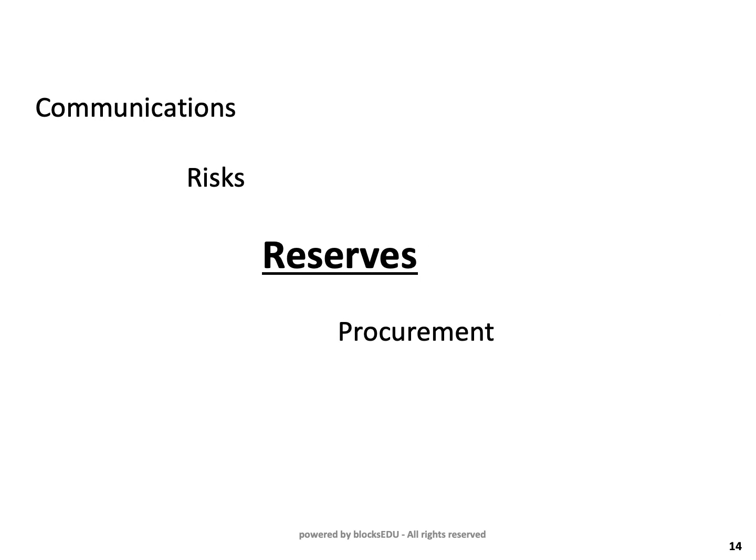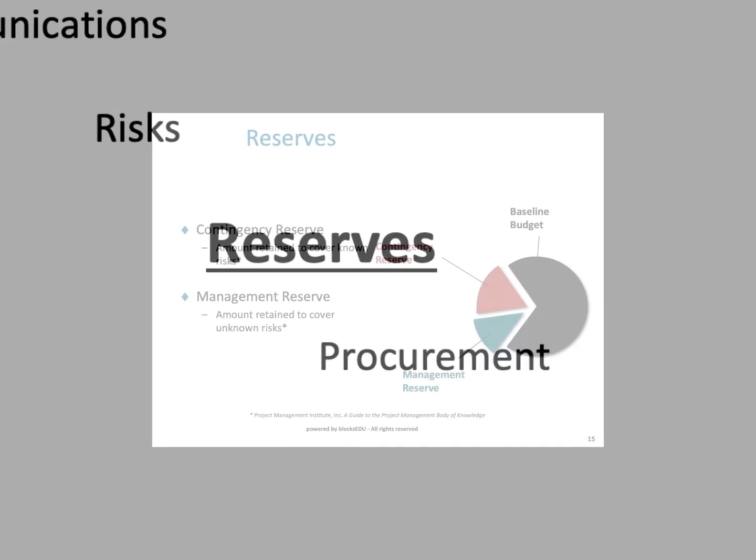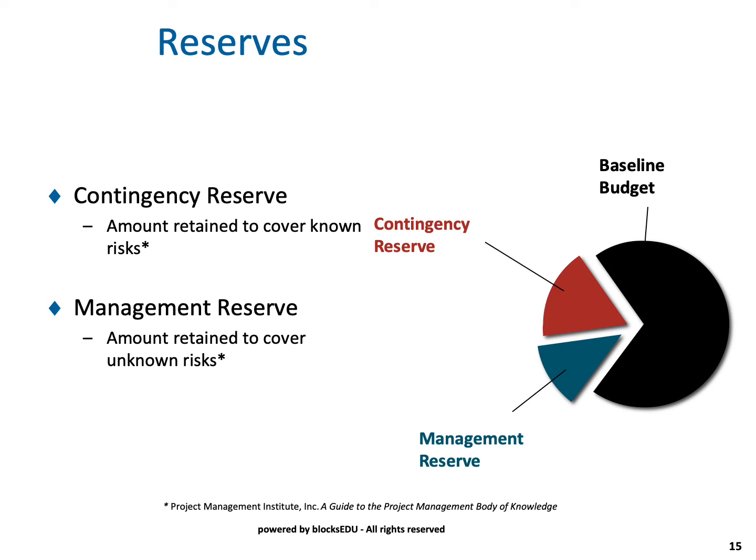We're next going to explore the wonderful world of reserves, or often called contingencies. Reserves or contingencies. Interesting topic, this unto itself, is that in many organizations, the organization has determined that for every project they're going to allow what's called a contingency. It's basically an overrun. They'll say, well, our contingency, because we don't know what we don't know, we're going to allow 10% overrun. We're going to allow whatever the budget is, add 10% on it, 15% or 20%.